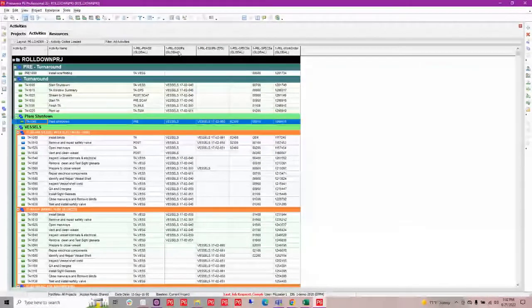I've also found that I have two equipment codes that have been assigned to my project. However, they're in two different levels. They're in two different lists or dictionaries. I have global and I have EPS. Well, I want to keep these, but what I need to do is combine these. And then I want to have the new code sit at my EPS level because my equipment number, again, is important to the projects in my EPS.